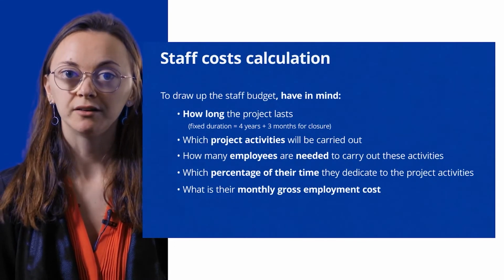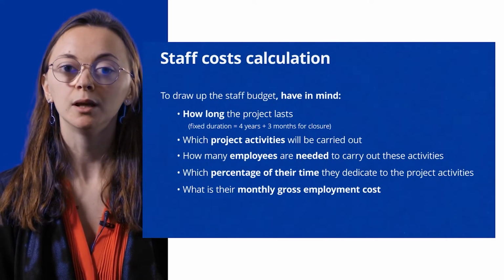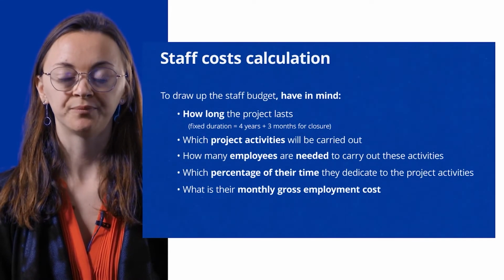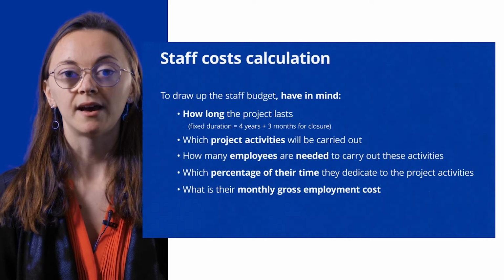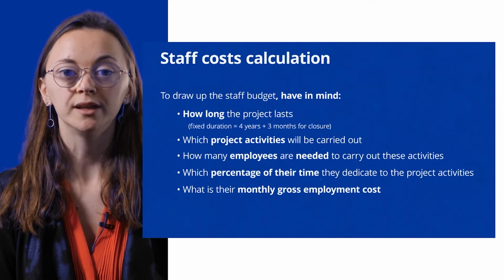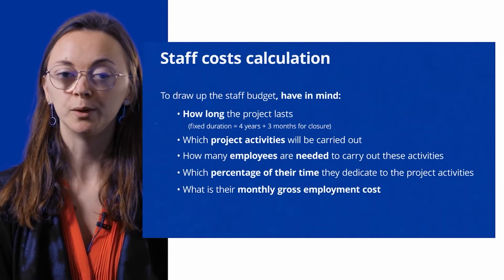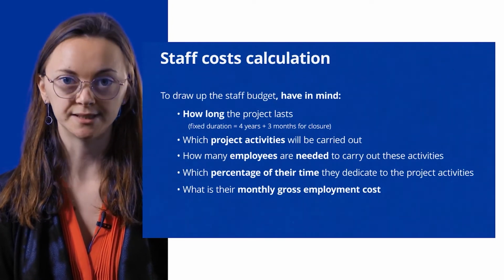So then for the calculation of staff cost, there will be only one possible method. It will be with a fixed percentage. So this means that the project employee could either be working at 100%, full time, or it can also be working part-time, but with a fixed percentage.